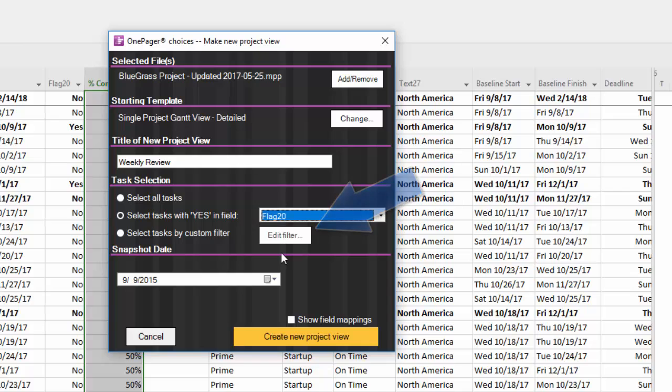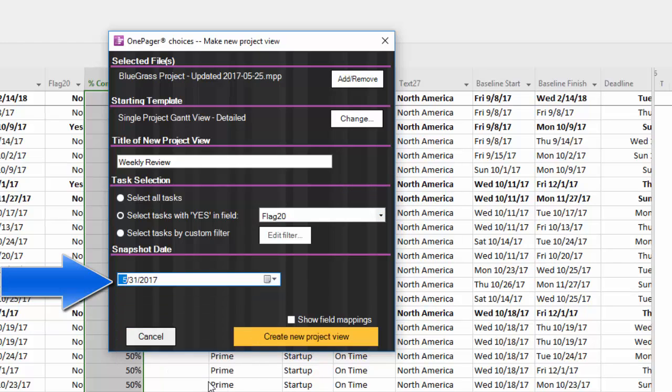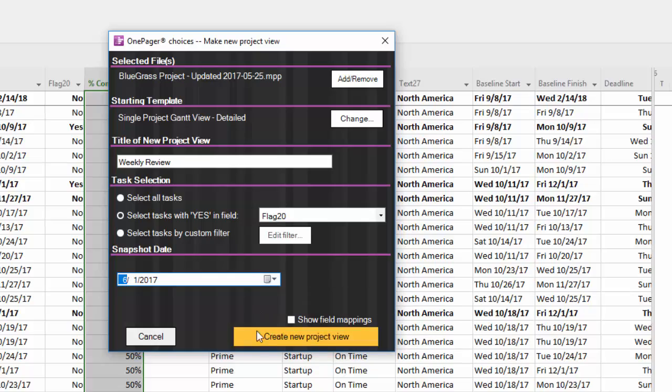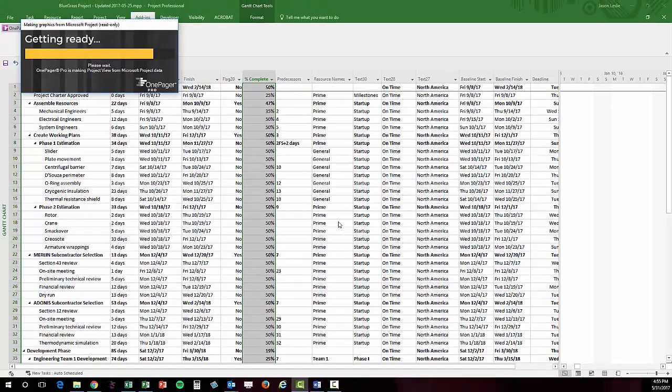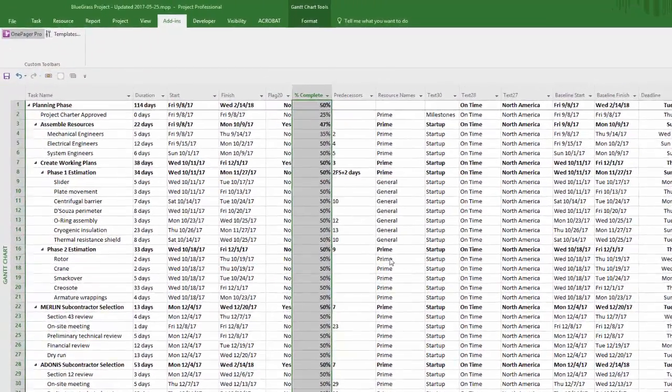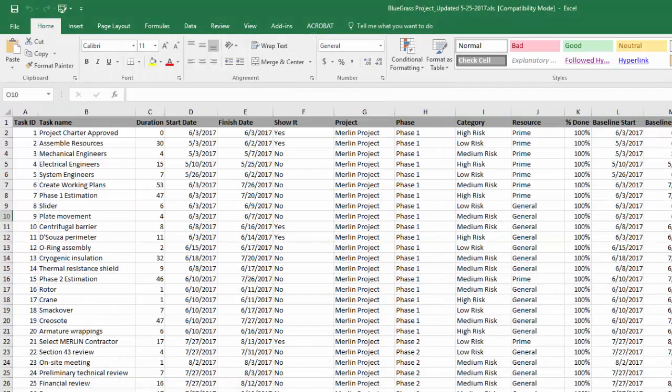Now I'm going to give my view a title. The task selection section is where I will tell OnePager which flag column I've used as a designator. Finally, I must choose a date for my snapshot. In the example here, I'm going to choose today's date and then click Create New Project View. OnePager reads my yes values, combines that data with my template settings, and renders me a new OnePager document and initial snapshot.